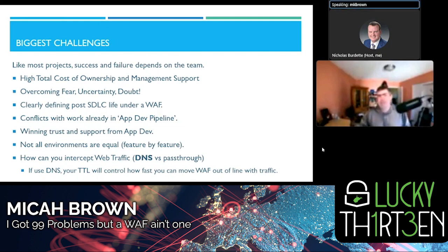And this one caught me by surprise because I don't run in the DevSecOps world a lot. I found out that not all of our environments were equal when I'm talking about feature by feature. There was one company that we were putting WAFs in where their lowest level environment had 5 different versions of it, and certain functionality was only present in 1 or 2 of those. That made it really challenging, and we ended up not deploying to that lowest level environment because it wasn't uniform. It wasn't representative of the higher level environments.